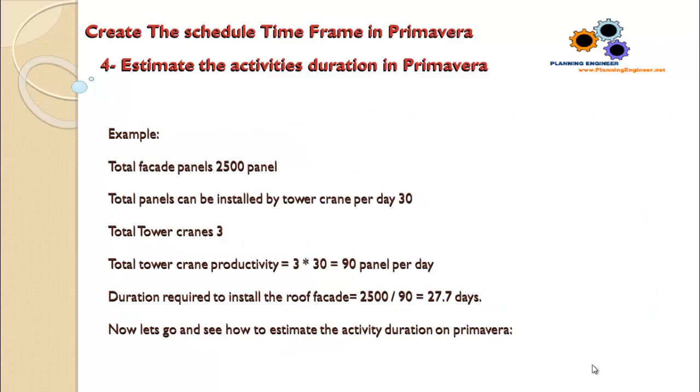Let's say that we have total facade panels of 2,500 panels. Total panels that can be installed by tower crane per day is 30. Total tower cranes is 3. So the total tower crane productivity equals 3 times 30, which equals 90 panels per day.